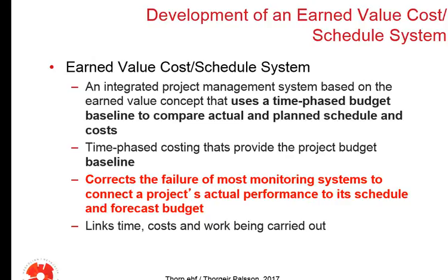And then comes the earned value concept, which is something you have to be well familiar with. The earned value concept, or the schedule system, is not new. It goes back, has been used in the military and various others. But that is not of issue. What is more important is, what is it about? It's an integrated project management system based on the earned value concept that uses time-phased budget baseline to compare actual and planned schedule and cost.